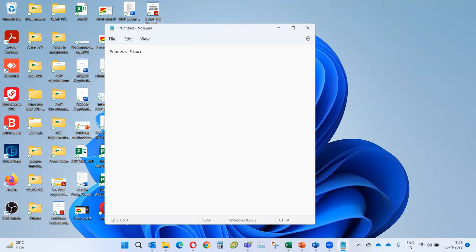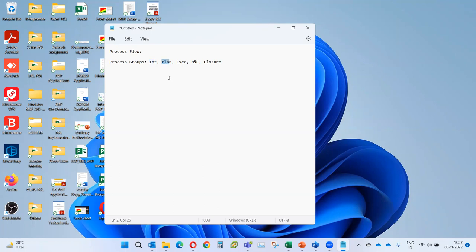We call this the process flow diagram. One way is to go with the process groups — initiation, planning, execution, monitoring and control, and closure. Initiation has only two processes, closure has only one, and in total we have 49 processes.